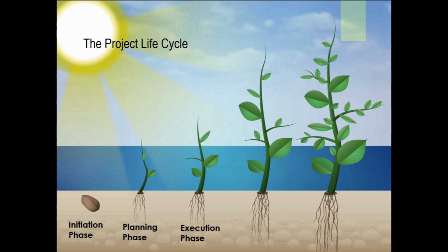And then the last phase is the closing phase. There's more to this phase than you might think. All final deliverables must be released to the customer, such as the project documentation. A customer sign-off is typically required. Remember the list of project requirements that the customer agreed to in the planning phase? Well, this is the sign-off on all those identified elements. All the resources must be released from the project, including the human ones. Last, a lessons learned study is done to determine how the next project can be completed better with less complications or issues, and lessons learned documents are then stored for future reference.